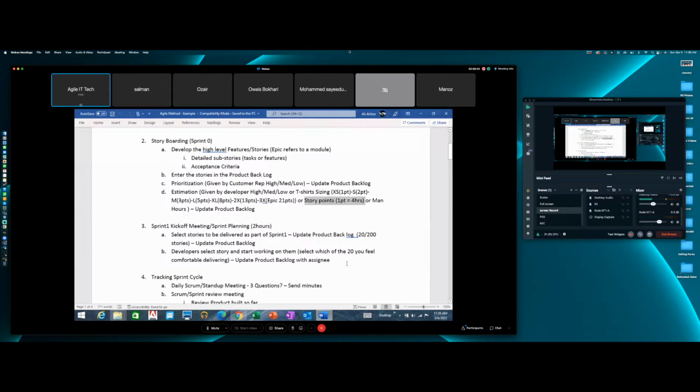So say your team is taking on average 4 hours to complete extra small tasks. Then you know that 1 point for your team on average is how many hours? 4 hours. So then a small task would take 8 hours, one day.